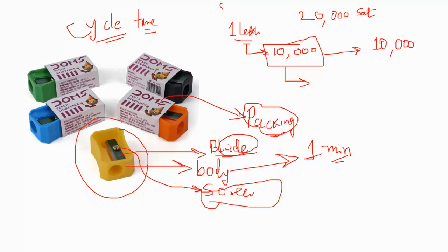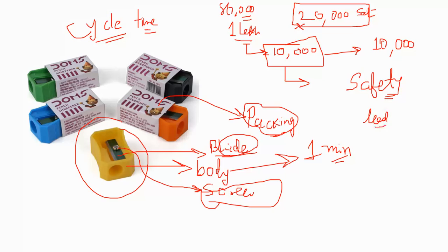So you will give an order of 80,000 only, but not the whole 80,000 at one time. You can do this as 20,000 in 4 parts, or 40,000 in 2 parts, or 10,000 in 8 parts, whatever, based on your inventory setup. If you have 20,000 already in hand, you also have to keep safety stock in mind, because the supplier also needs some lead time and transportation, and he is also procuring material.